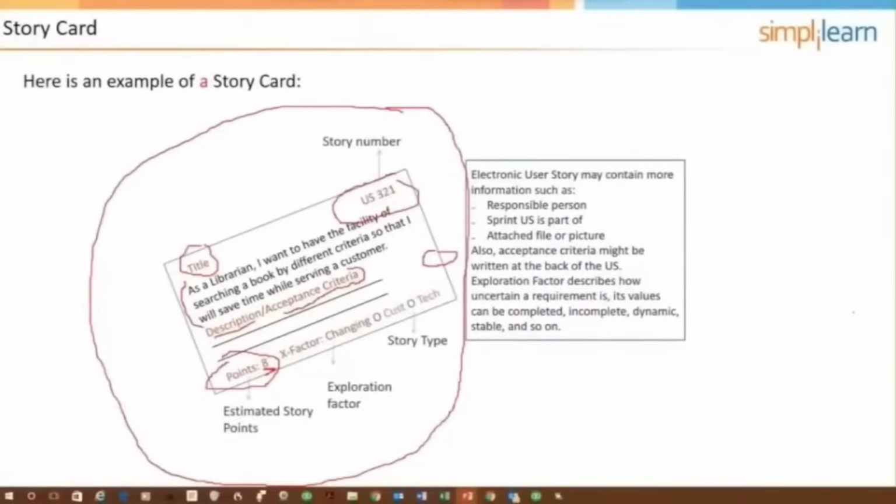Just like we were doing in planning poker, the product owner might say, well, this story is twice as valuable as this other one, comparing them together. And these value points are what's used to prioritize the user stories. That's supposed to be a V, as in value points. And then typically there's also going to be an indication. Sometimes it's just by colors. It could be words that have to do with where the story came from.